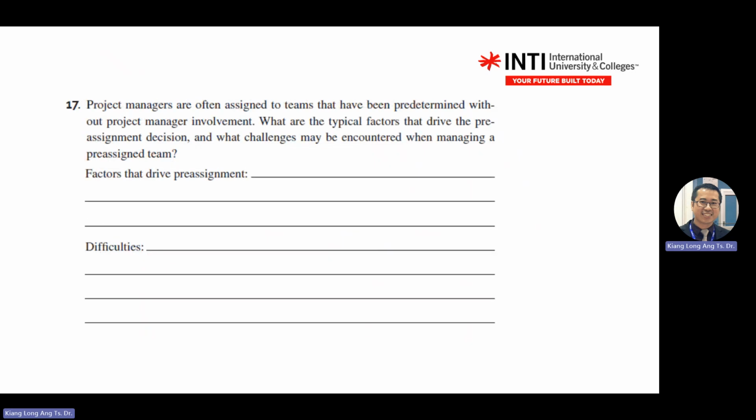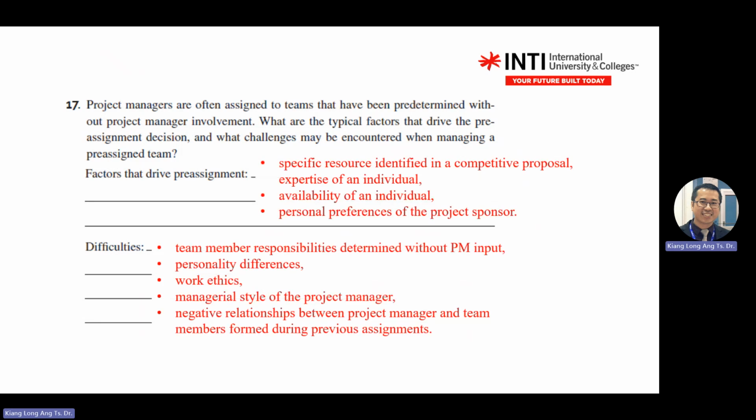Project manager, this one, factor difficulties. This is also a factor. So the factors that drive pre-assignment are resources and expertise that you need, availability of an individual, personal preference of a project sponsor. So when you assign a team, it has been predetermined without project manager involvement. Typical factors that drive pre-assignment decision means before you join the team, the company already selected the team for you.